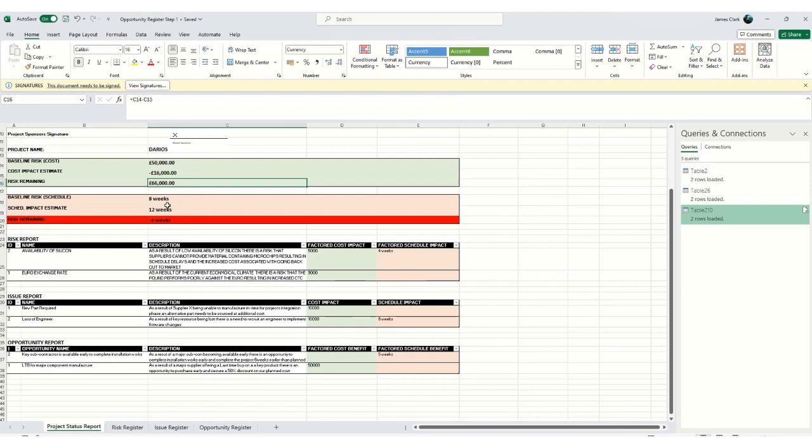And you can see that's going to put the baseline risk cost at 66,000 now. It actually would give us more contingency fund than what our original baseline was. So we may look at rebaselining at this stage. You know, if we're going to take on these opportunities, we may be looking at rebaselining.